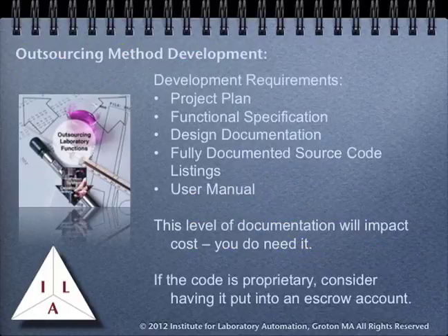The development requirements include the elements we covered earlier, including project plan, functional specification, design document, and two things we haven't stressed as yet: fully documented source code listings and user manuals. You can't assume that the vendor is always going to be able to assist you in the future. The company may have been in business for quite a while and have a good reputation. Their ability to support you depends not on their history, but on the people that are available to work with you, and that is something the vendor has no control over.